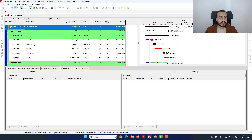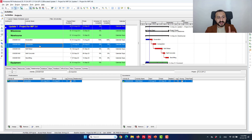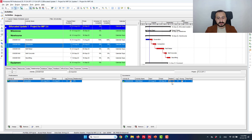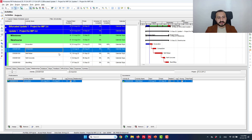After investigation, this is what I have seen. In this window, during this period, the contractor made a change — they changed the relationship between compaction and rebar. It was finish-to-start. And if you remember, the bifurcated one is a copy of the previous update with actuals imported before any changes, so it was finish-to-start. It means the contractor made a change: they changed the relationship from finish-to-start to start-to-start with a lag of four days. So they mitigated the delay — they allowed an overlap between excavation and compaction, and between compaction and rebar.